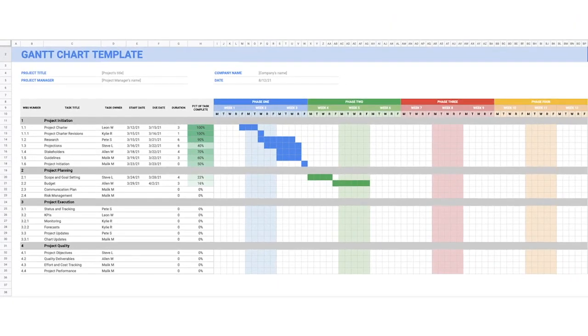On the right side of your sheet, you'll order your columns by the weeks estimated to complete the project from start to finish. In the rows below that, you'll include bars representing the dates when certain tasks will take place. Kinda neat, right? Spreadsheets are helpful here because they can hold more information than just the Gantt chart. Though the project schedule serves as the central component of the project plan, you can use separate tabs on your spreadsheet to house or link to other documents you'll want to include in your plan, like a RACI chart or a project charter. You may also opt to include your plans for risk management and communication here too.